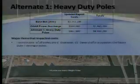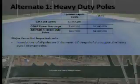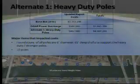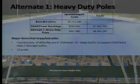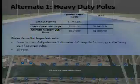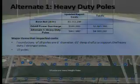The base bid is about $3.1 million. About $580,000 is what OG&E is asking this project and the city to pay to extend their infrastructure, bringing the total base bid to just shy of $3.7 million. We are aware it is a little over budget, and that led to some of the alternates.